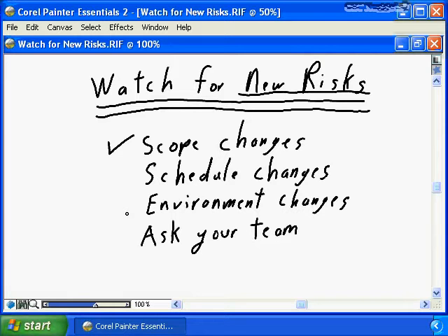As the schedule changes, as the schedule becomes tighter or as the schedule becomes more relaxed, different events will happen, different processes in the project will have different urgencies, therefore the risk impact or the risk possibility for the schedule will change. As the schedule changes, you need to reassess the impact for risks and take the appropriate actions.